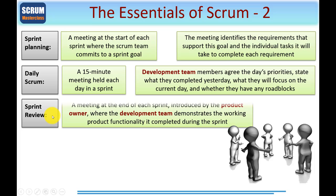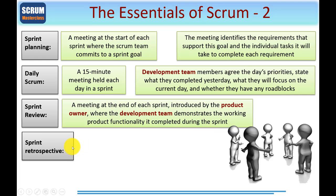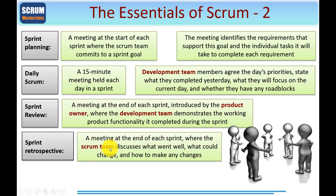Then the Sprint Review — which is actually a presentation, a meeting at the end of each Sprint, introduced by the Product Owner — where the development team demonstrate the working product functionality they have completed during the Sprint. And finally, the Sprint Retrospective, which looks back on the Sprint itself. Here the whole Scrum team discusses what went well, what could change, what they could do better, and how to make any changes. Remember, Sprints occur one after the other, and in a typical project stage you may well find many Sprints held sequentially, so these steps would occur for each of those Sprints.